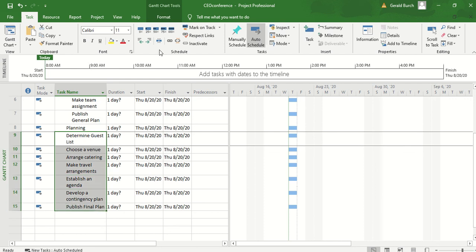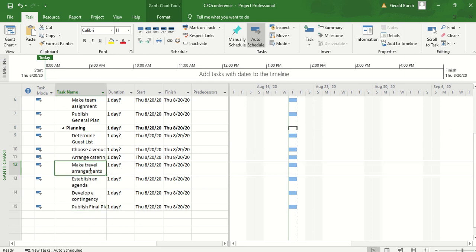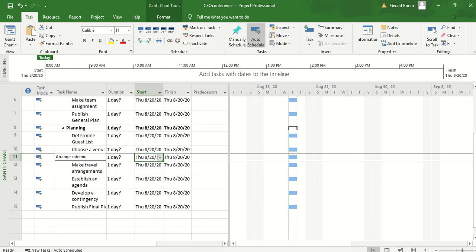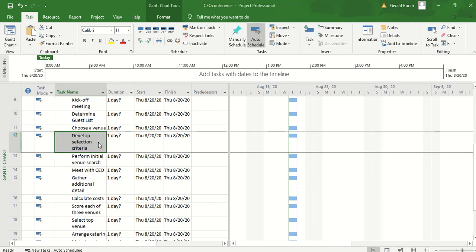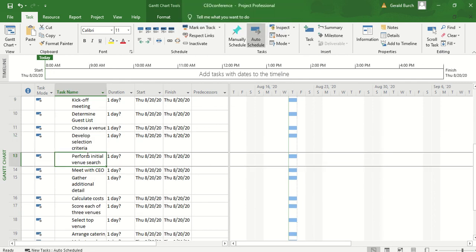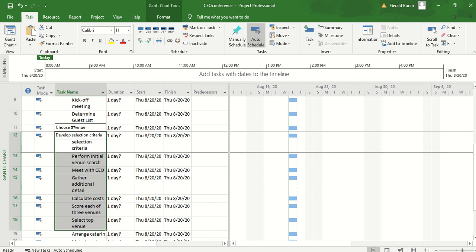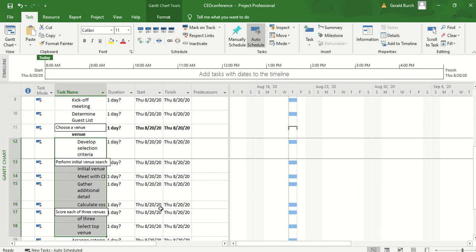There are a couple of things that it tells you to add along the way. One thing that it certainly tells you that you need to do is that you realize that choosing a venue has other subtasks associated with it. So I'm going to pause for a second and add these items underneath choose a venue by just inserting. You can see now that I have added underneath choose a venue. I've added the subtasks that are here and these subtasks once again are subtasks that are underneath choose a venue which means that they need to be indented so that choosing the venue has these things associated with it.